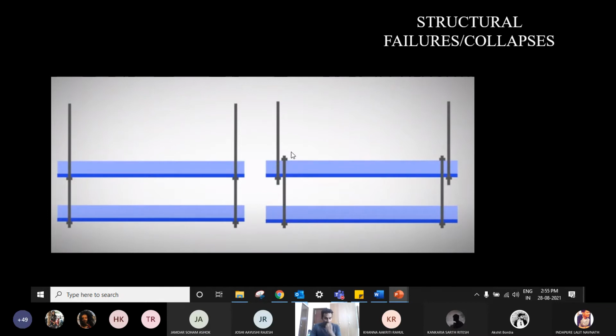Now usually what happens in structural design, which is happening in the United States and is coming right now in India also, is that a designer would design something and provide design drawings. There's something called fabrication drawings, which is created by the fabricator or the contractor. The contractor gets your design drawings, which tell you overall what needs to be built and in what way.